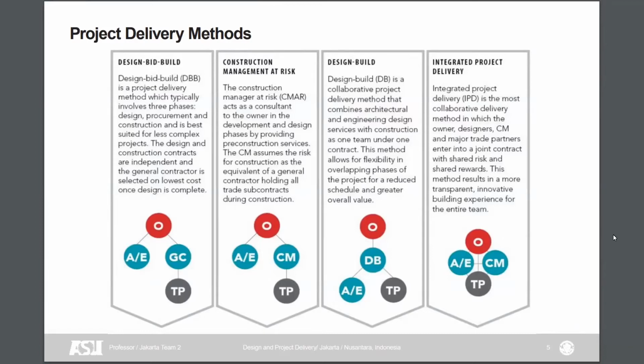And then in construction management at risk, the construction manager acts as a consultant to the owner and assumes risk for the construction. Under design-build, it's a collaborative process between architects and engineers and allows for flexibility in overlapping phases. And the last one, integrated project delivery, is the most collaborative among the four because it uses a joint contract between the parties, and it is often the most transparent and innovative.